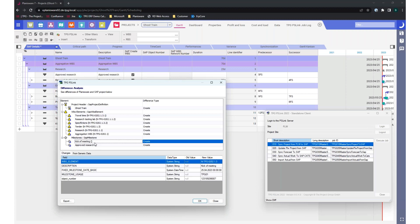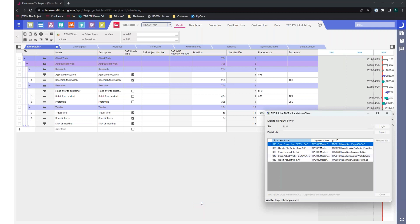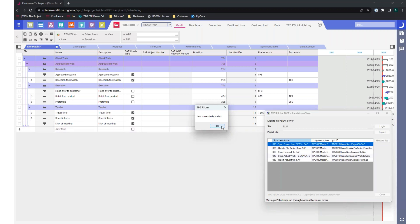For example, it wants to create a project definition in SAP with all the corresponding fields, then create WBS elements — I can check all the fields that should be created — and the same goes for SAP milestones. The interface is not a black box. As a project manager, you have full control to see what the interface will do, and every time you can say no, please don't synchronize this — I made a mistake, or I want to synchronize a different task. When everything is fine, we let the interface run and we get a success message that the project was created in SAP.